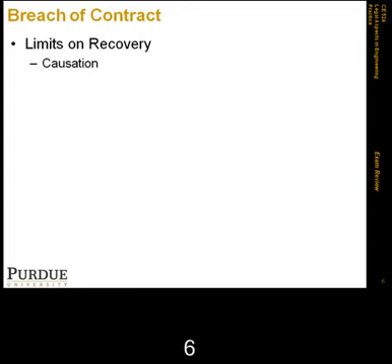So there has to be a cause and effect relationship. The loss may have been caused by multiple factors, and it may be difficult to prove the amount of the loss caused by a certain condition or by other contributing factors. But it has to be shown that the loss is substantially caused by that breach of contract. So it doesn't need to be the only factor, but it has to be responsible for the majority of it.